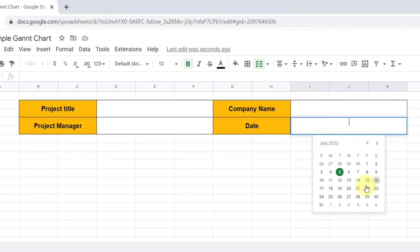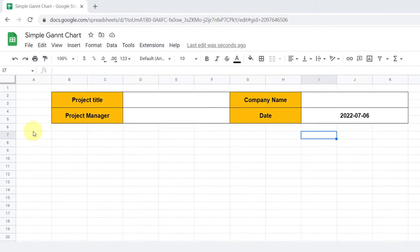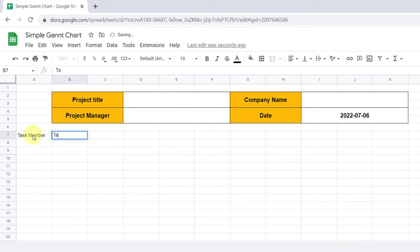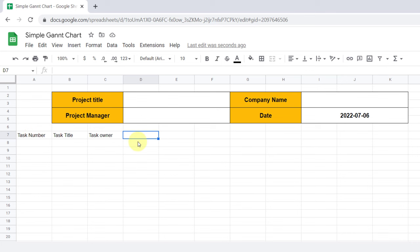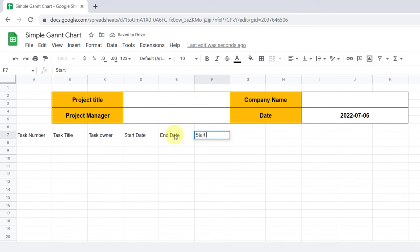Now I should build the task table. For the header, I add task number, task title, task owner, start date, start on day, and duration. Let's do some formatting and add data to the table.